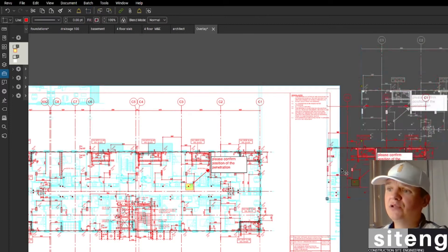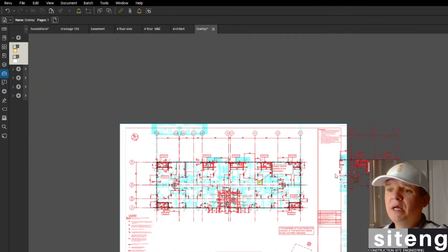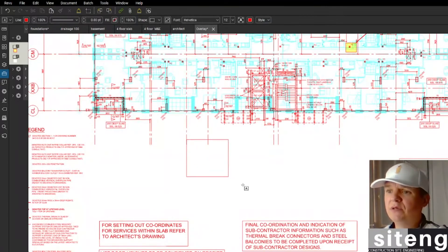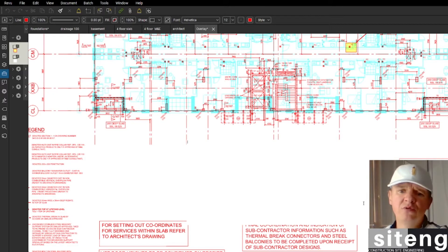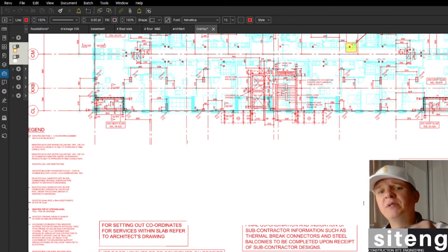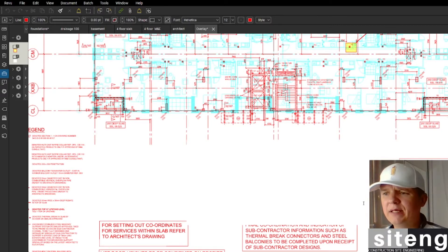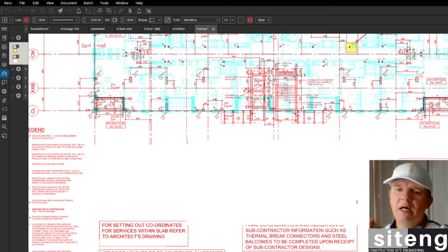For the email I would take a snapshot of it with the grid lines visible, paste it in, and clearly explain what's going on. To make it official in the RFI, I'd put the text for it depending on what platform you're using — whether you're sending the RFI through email and keeping a record, or through a platform like Asite.